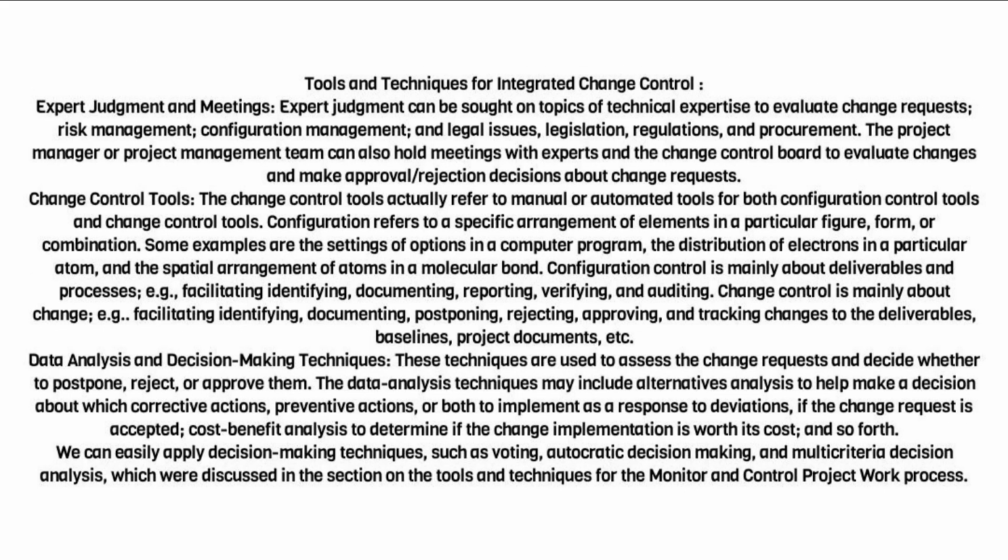Tools and techniques for integrated change control. Expert judgment and meetings. Expert judgment can be sought on topics of technical expertise to evaluate change requests, risk management, configuration management, and legal issues, legislation, regulations, and procurement. The project manager or project management team can also hold meetings with experts and the Change Control Board to evaluate changes and make approval/rejection decisions about change requests.